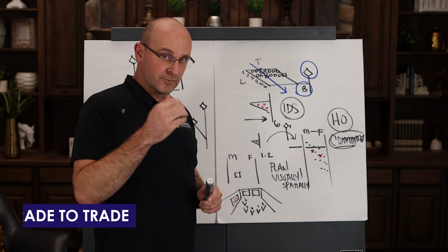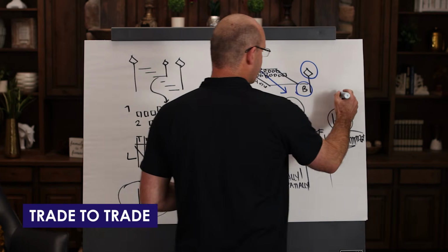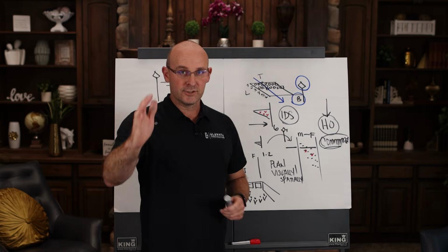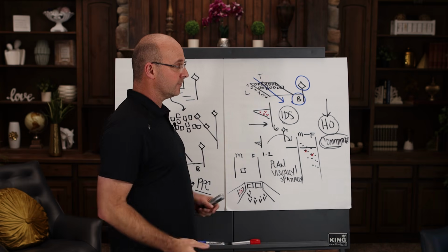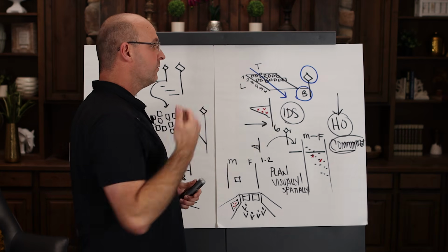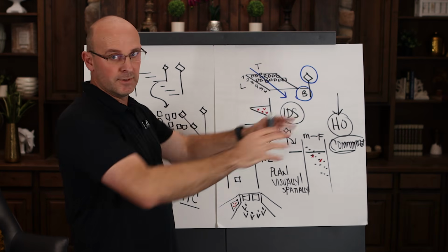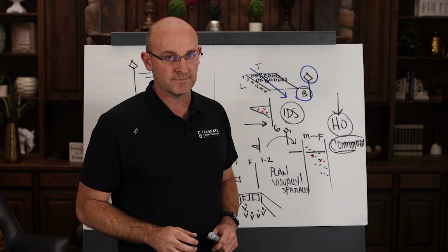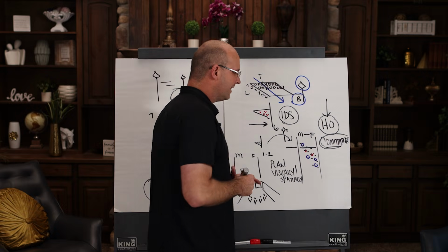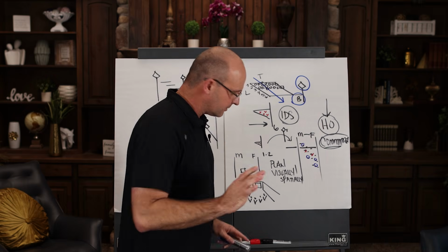And that from trade to trade, we're coordinating these handoffs, and that it's not trade to super to trade. If I'm a trade partner, I look at that other foreman and make commitments. I've weighed in, I've bought in, and I've made commitments. And we will have a better chance of those activities actually hitting with that. And each of your handoffs should be clearly marked on your weekly work plan. And that is the main thing you review in addition to the roadblocks.